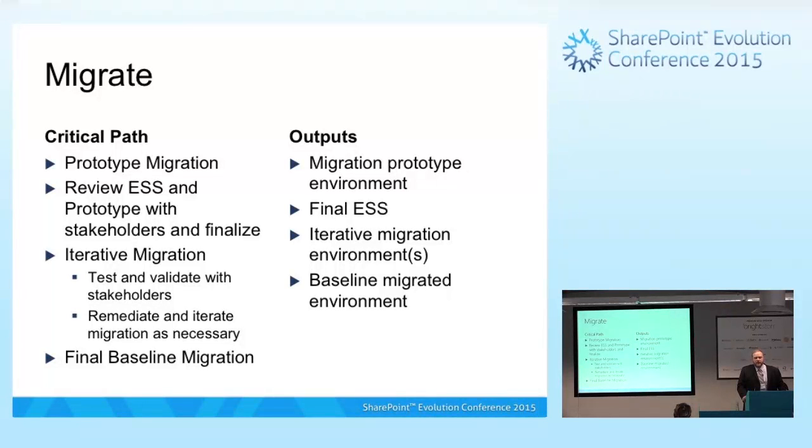The requirements traceability, the difference between the requirements traceability matrix and the end states and one of the specifications is the level of specificity that goes into what you're talking about, right? The understanding of a requirement is mapping to a specific use case you want to support, right? We want our users to be able to use my sites. We want our users to be able to upload documents with PII. We want a record of this particular classification to dispose itself after 3 years or 3 months or 3 days